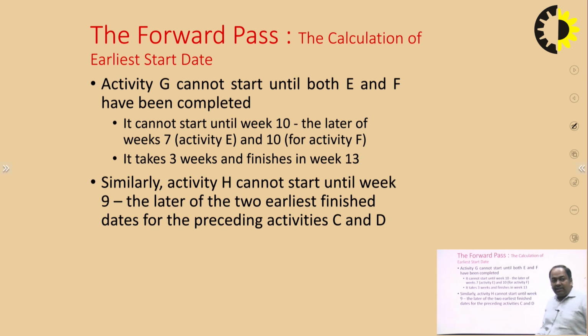Similarly, activity H cannot start until week 9, the later of the two earliest finish dates for the preceding activities C and D.